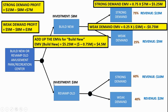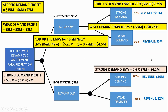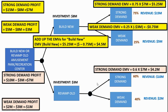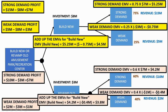Let's find the EMV for the revamp option. The profit, if there's a strong demand, is going to be 10 minus 3, then multiply that by 0.6, and we come out with $4.2 million. For weak demand, that's $2 million minus $3 million, which gives minus $1 million, then multiply minus $1 million by 40%, giving minus $0.4 million. Adding those together, you end up getting $3.8 million.